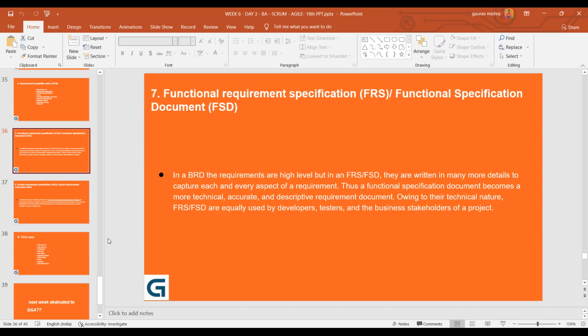And whatever we learned till now, for example use cases, the approval matrix. Approval matrix means whenever any document is prepared. For example, imagine you are a junior BA, when you start, whenever you create any documentation, that will be reviewed by your senior BA or your team lead. Post his review, this will go to your scrum master and product owner if we are in agile. If we are in a typical setup, after the team lead it will go to your project manager.